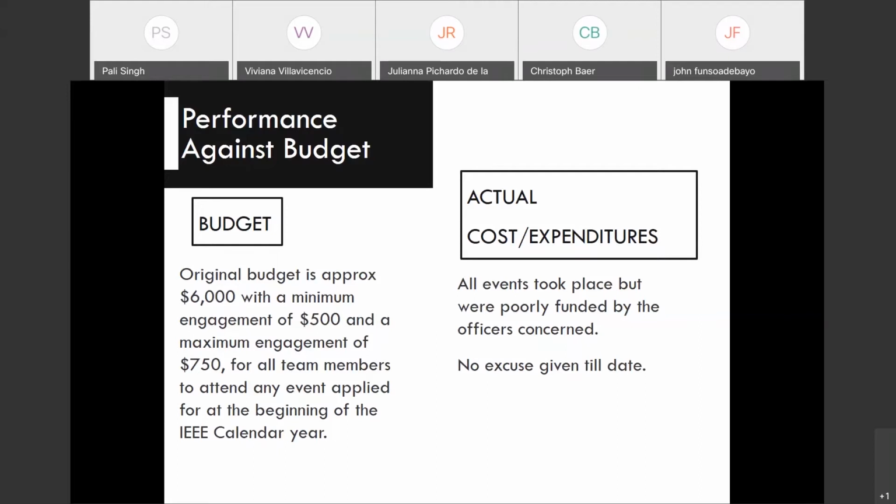And we calculated the manpower of the volunteers, which could have yielded, in an academic environment, something you call the credit, the continuing educational units. So we calculated the manpower and we discovered we have invested close to $2,500. So in total, the ongoing projects might eventually be worth $15,000 when the second phase is completed, which is the drilling that we're going to start in the dry season. But basically, when you're looking at a sustainable project, the cost is not ending. It's not cast in stone. Because even though you have the metrics written down, at every point in time, one thing comes up that is not well thought out, and so you have to add it under logistics or miscellaneous. And that's how we're able to manage ourselves.